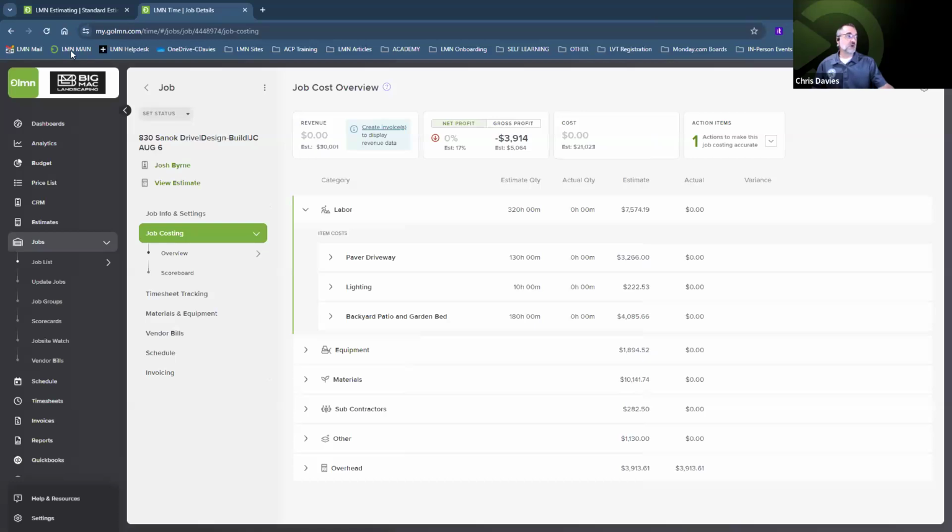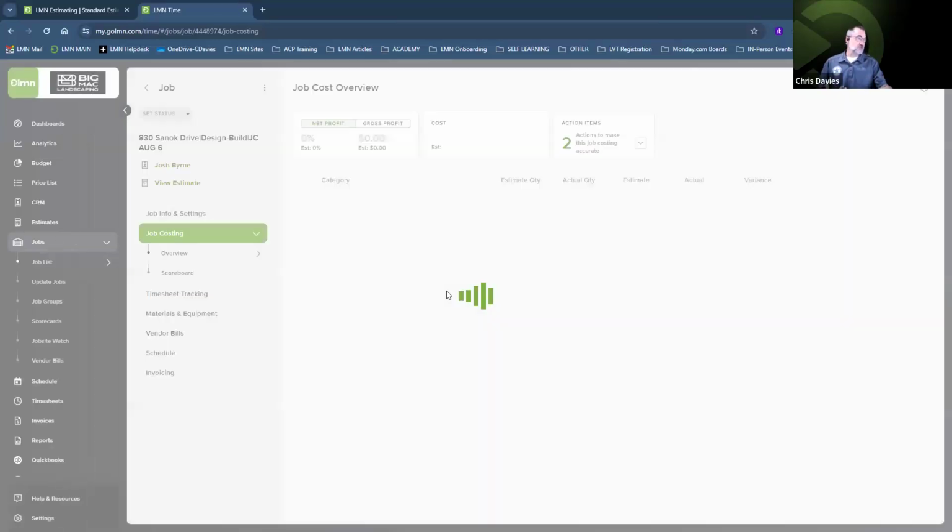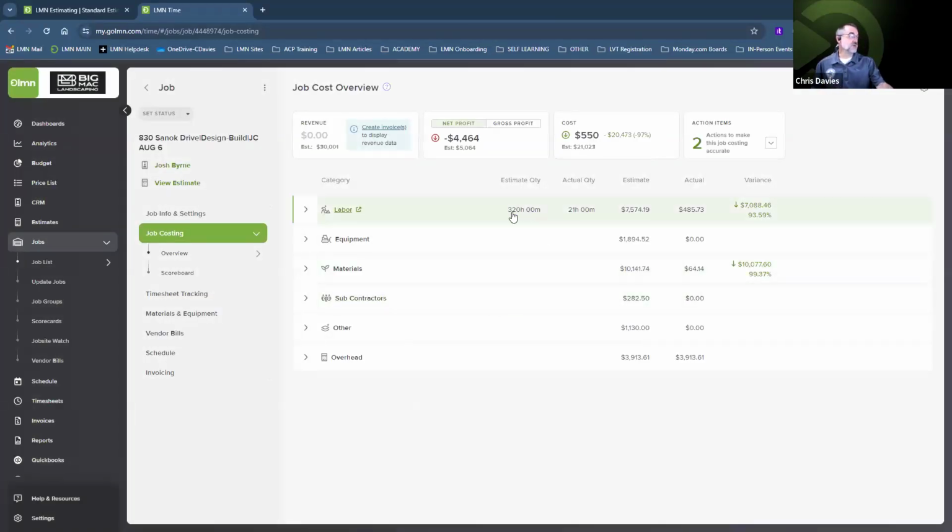Now, if we go back into our job and just do a quick little refresh, okay, now we'll start showing some actual information, right? So now I've got 320 man hours estimated. I've now logged 21. Now, of those 21, it had an estimated cost total of around $7,500. But right now we're at a total cost of $485.73.